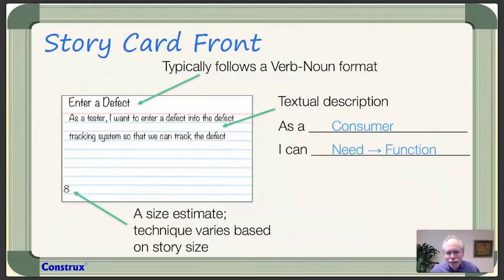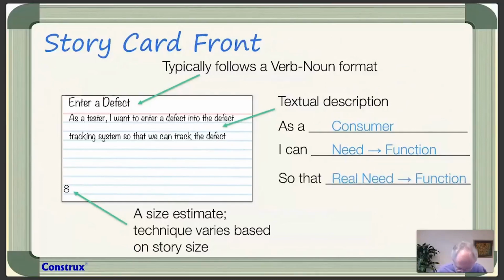It's like, no. So they said, you know what, let's put another field on here, a "so that" field. And the "so that" field was there to say, okay, why do you want a report? Well, I need a report because I need to make a decision. Well, that's what I'm looking for here. That's the ticket. The "so that" field right here is optional.